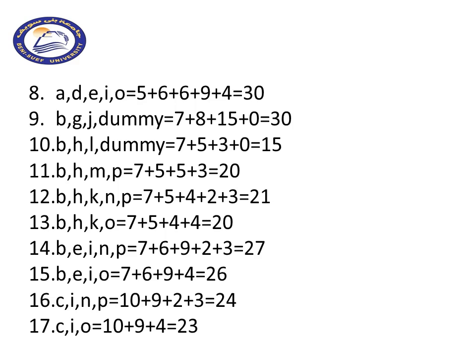Okay, what defines the critical path out of these 17 paths? The critical path is the one with the longest duration. As you can see, the path with the longest duration is the one that consists of activities A, D, G, J, and dummy, with a duration of 34 weeks.